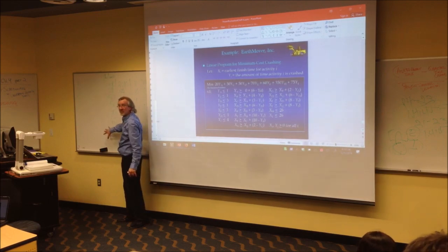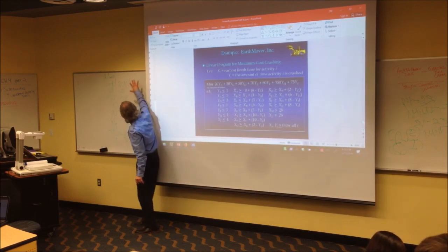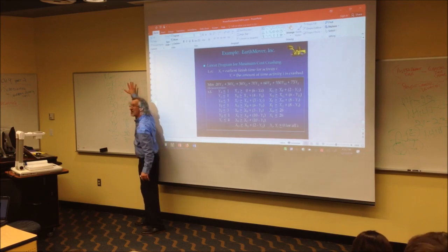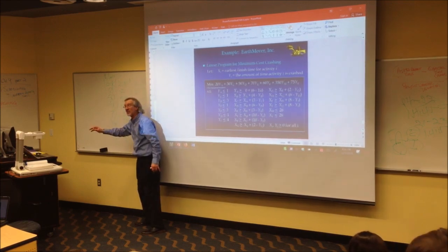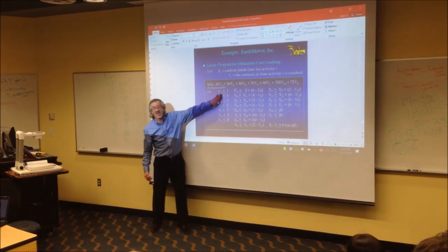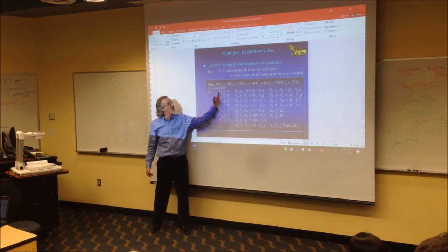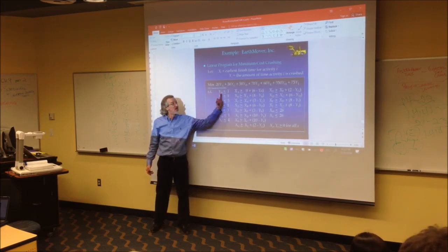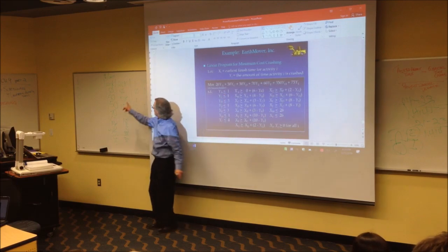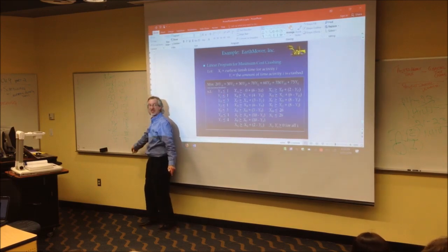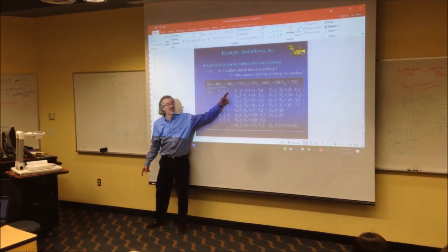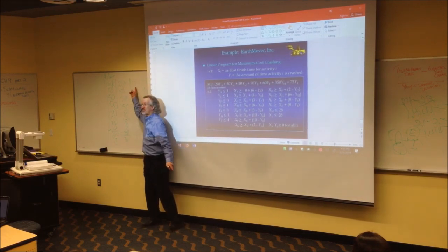Get it? All right. Next, you did this work right here to write your Y constraints, they're called. These are the Y constraints. It's the Y with each activity variable less than equal to the number of units it could be crashed. Y sub A less than equal to 1 because there's only 1 unit available.